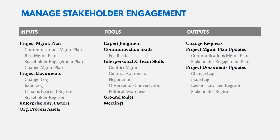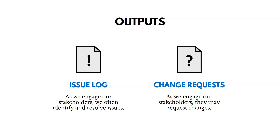As you engage with stakeholders, you need solid communication and interpersonal skills to help resolve issues, especially on sensitive topics. You may also have ground rules. The key outputs are change requests and the issue log. If stakeholders feel things aren't going as planned or they'd like things done differently, they may submit change requests. As we engage with stakeholders, we also identify and resolve issues, updating the issue log accordingly.